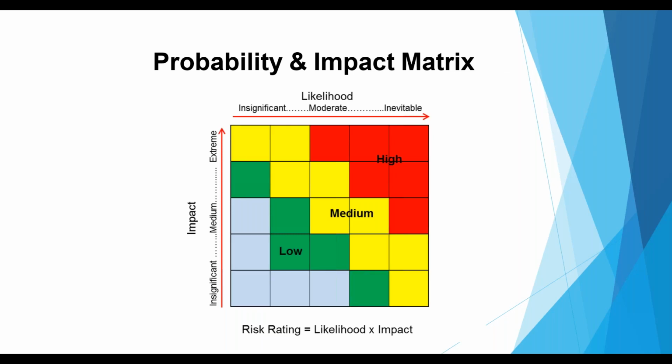And this is one of the matrices which you can see. This is the final result of the probability and impact matrix, where you can find different color codings like blue, green, yellow, and red. Red means high probability and high impact risk, which is more dangerous to the project objective. Medium means there are strategies which should be implemented to mitigate those medium risks as well. And the low priority risks are those which should be dealt with in the later stages of the project. For project companies, the high and medium category risks should be addressed first, and then the lower category ones. Okay, next slide.